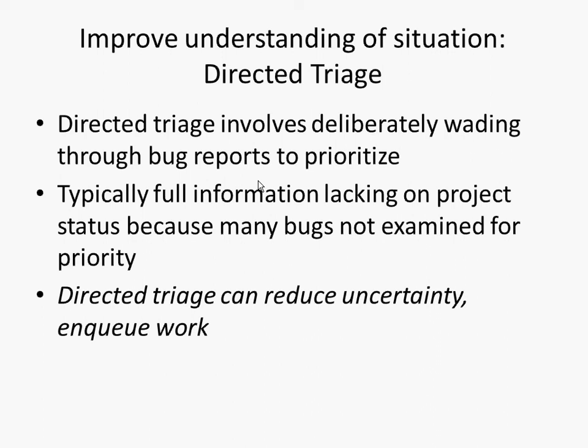You might even want to do this if you don't have time before the end of a milestone. You do it at the beginning of the next milestone. Where are we at? Do we really have the luxury of implementing several features, or do we just need to clean house and fix these bugs? If a team last year had done that, the client would have been far less disappointed. Okay? Okay, so those are some comments on defect reports, and I'm going to